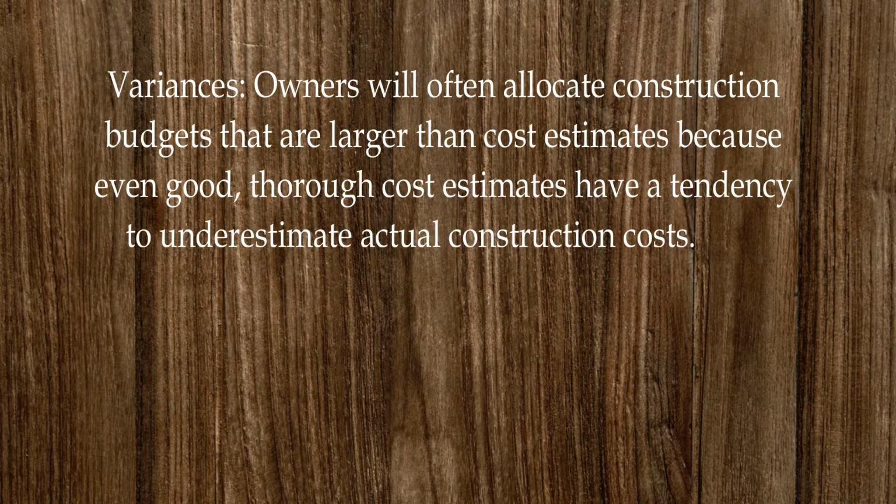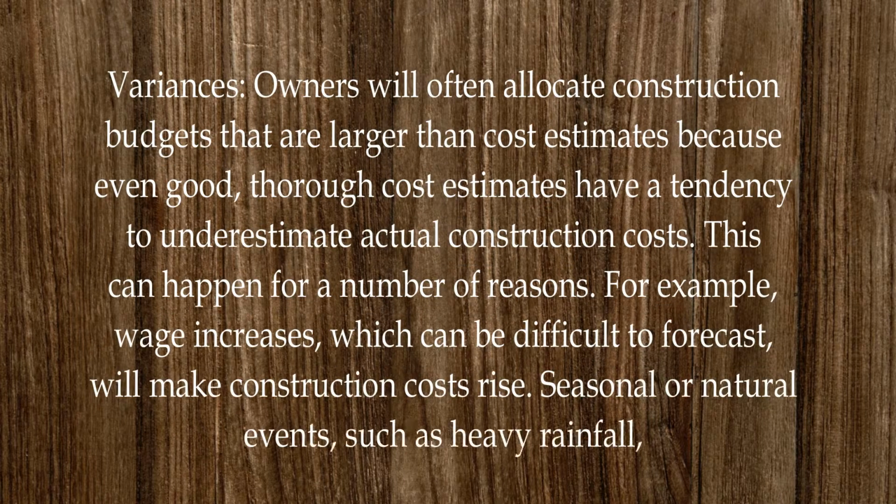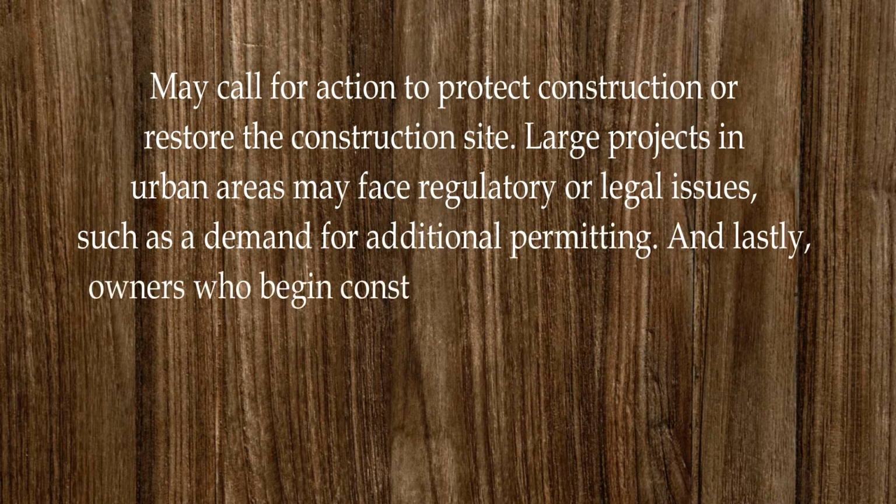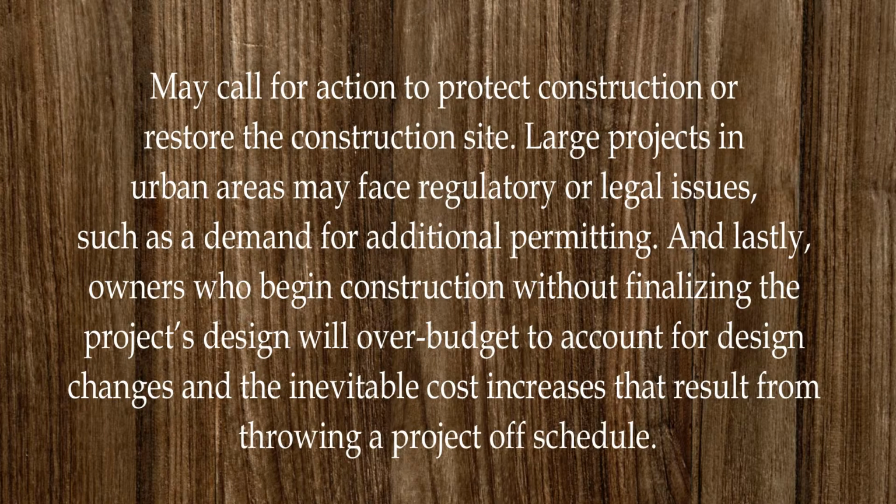Variances. Owners will often allocate construction budgets that are larger than cost estimates because even good, thorough cost estimates have a tendency to underestimate actual construction costs. This can happen for a number of reasons. For example, wage increases, which can be difficult to forecast, will make construction costs rise. Seasonal or natural events, such as heavy rainfall, may call for action to protect construction or restore the construction site.